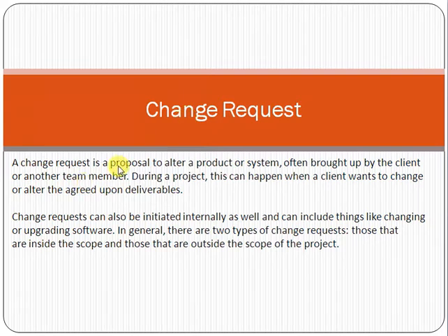So let's start. Change request. Change request, friend, is basically a change in the agreed scope. Are you getting my point? Let me tell you, for example, you have initiated a project in which you have to give 5 modules in a mobile application. Let's assume the scope has been signed, the contract has been signed, and the project is initiated. After some time, the customer realizes that he needs one more module.